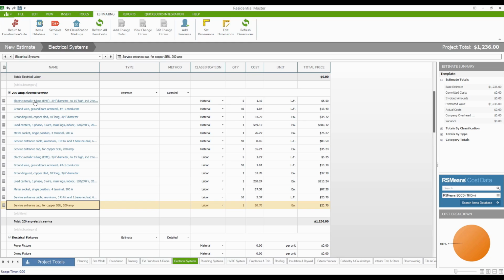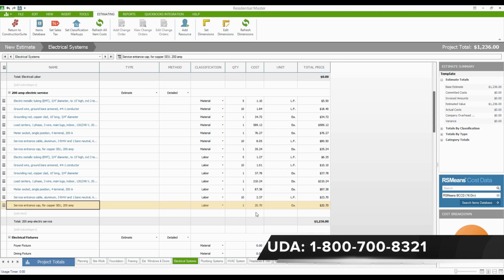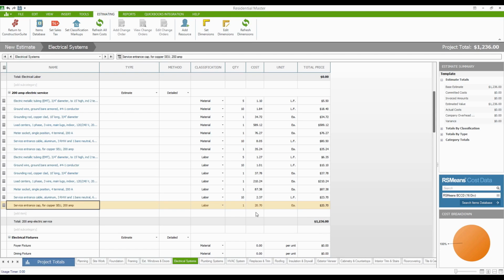Again, since they're linked into your cost books, if you guys are using the cost book items, you can always update the price in the cost book and then later refresh all your pricing here, and these numbers would be updated for what is currently available today. Now, it's not going to do that automatically for all of your estimates. God knows we wouldn't want to change the pricing information available in an estimate that's been underway for 6 months. So I don't recommend using it for those jobs, but for all of your new estimates that you're putting together, this is extremely handy, really time-saving feature here.